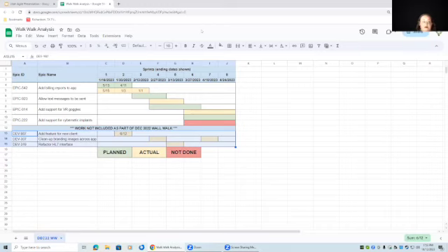Because part of being a Scrum Master is not only to coach your development teams and your product owner, but the wider organization. And if we can have tools like this that say, okay, we have a certain amount of capacity in which we can get this done. We usually just plan 2 sprints ahead, but we're planning on doing these goals in these 2 sprints. And if somebody comes along, like the product owner tries to push something into the sprint backlog, we always on our teams have that conversation of what's the trade-off.